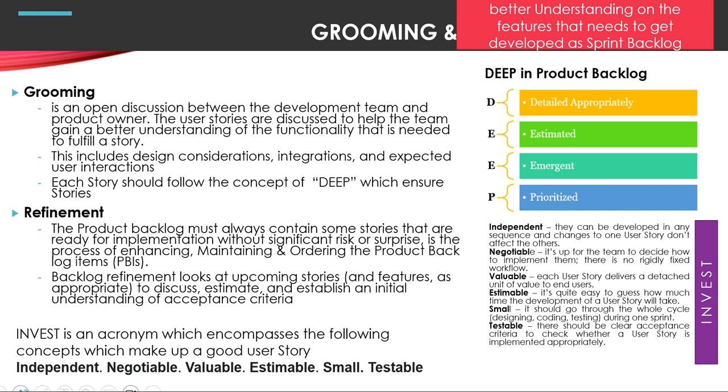Refinement means the product backlog must always contain some stories that are ready for implementation without significant risk or surprises. Backlog refining looks at upcoming stories and features as appropriate to discuss estimation and establish an initial understanding of acceptance criteria. Every backlog item should follow the criteria of INVEST. It's independent, it should be negotiable, it should be valuable, it should be estimatable, it should be small, and we should be in a position to test it.